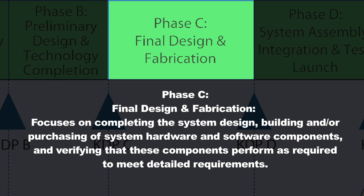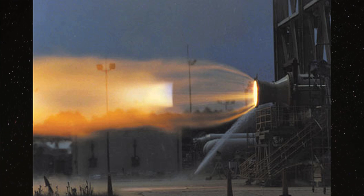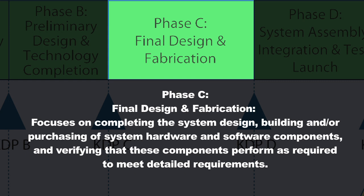You're building or buying all these components separately, and you want to make sure you've defined how they need to perform. For example, a thruster — you've defined how much thrust needs to come out. You want to take that thruster you just purchased and make sure it performs the way you wanted it to. You've also defined how heavy that thruster can be, so you put it on a scale to make sure the mass requirement is being met. You're verifying that the thruster can meet all the requirements for performance and capability defined earlier in your requirements development process.